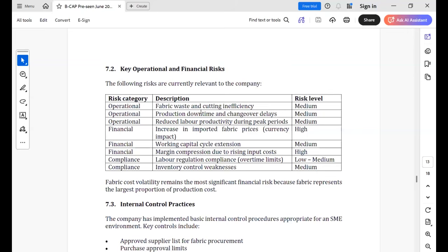And also after you categorize the market risks, operational, financial, compliance, all these risks, you have to put some marks, a scoring system. Based on that, you should be able to identify what are the top priority. How to identify top priority? You can decide based on the likelihood of occurrence and basically the magnitude of the damage, right? Level of occurrence, magnitude of the damage, right?